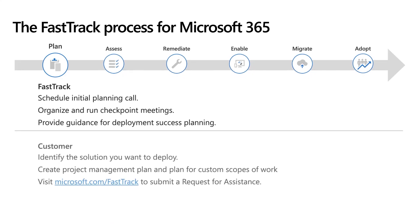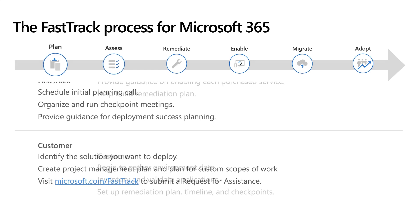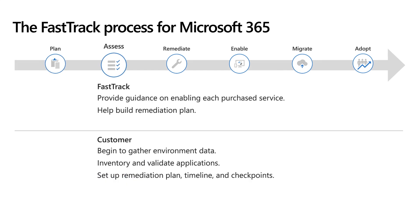During the plan phase, FastTrack will schedule an initial call and give guidance on how you can build your deployment success plan. Customers should visit Microsoft.com/FastTrack and submit a request for assistance. Customers are then responsible for identifying the solution they want to deploy and creating a project plan. In the assess phase, FastTrack provides guidance on enabling the service and provides timelines and checklists to build a remediation plan, while customers gather environment data, inventory, and validate their applications.